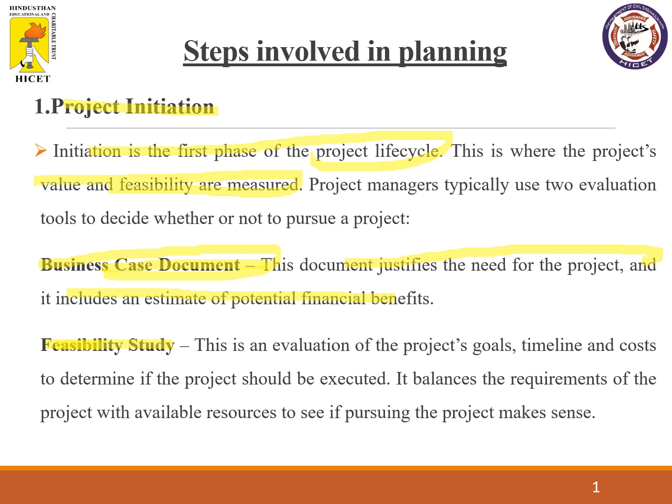And in the second part, the feasibility study, we will evaluate the project goals, timeline and cost to determine if the project should be executed. Like if there are no goals in doing a project, if there is no use of a project, why take up the project? If the project's timeline is too short, why take up the project? And if the cost is not according to the plan, if you are not going to get any profit, if you are going to incur loss in the project, you should not take it. So you have to study all those things in the second part, the feasibility study.